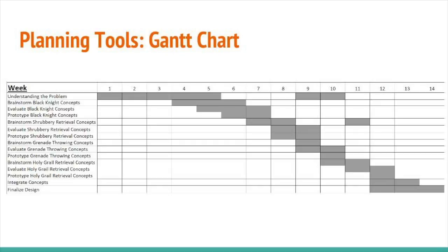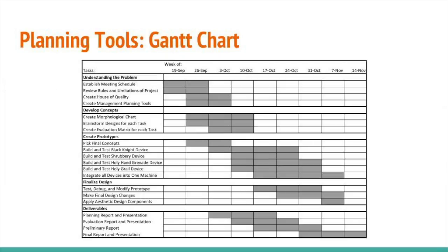The purpose of the Gantt chart is to assist in creating timelines for the major tasks of the project. Gantt charts can be as simple or as complex as necessary. Our chart lists timelines for 20 major tasks. Our chart is divided into 5 task categories. This method allows the team to visually see which portion of the project we will spend the most time on. One important observation we can make is that the tasks in the prototyping and deliverables categories have overlapping timelines. This tells the team that we must produce our deliverables as we construct and test our prototypes in order to meet all the deadlines.